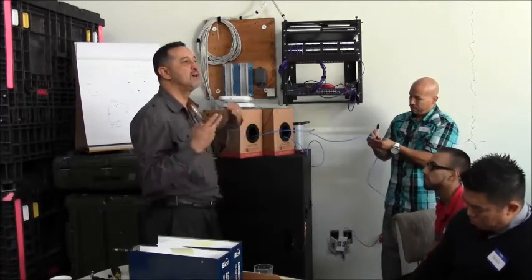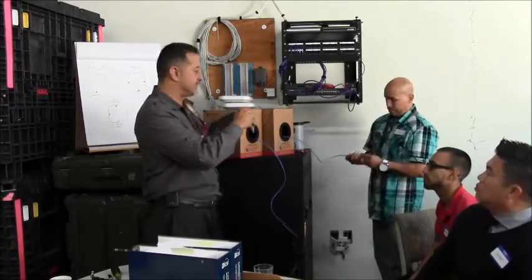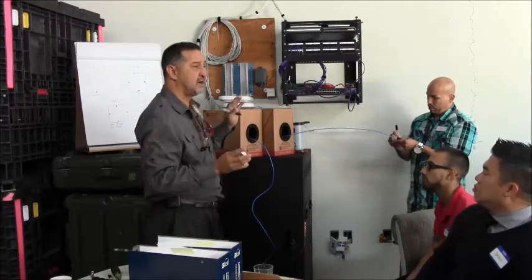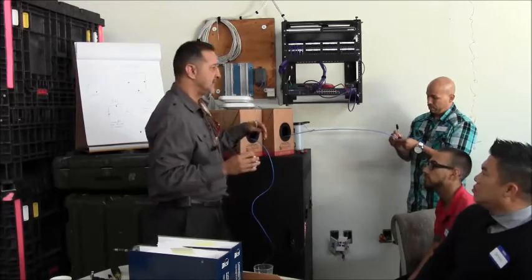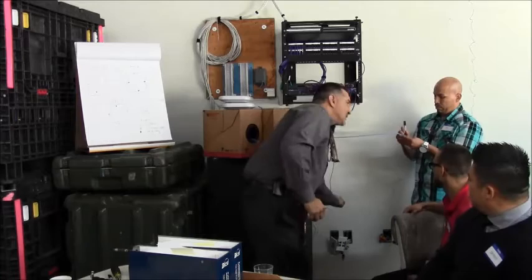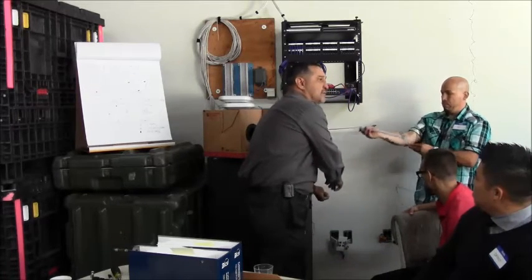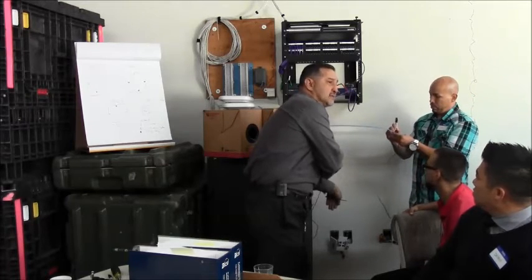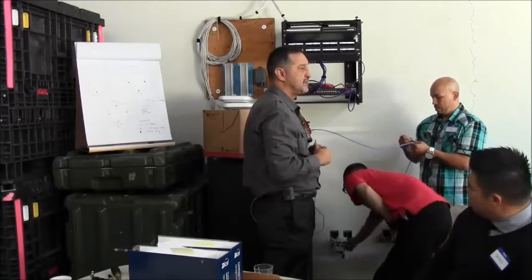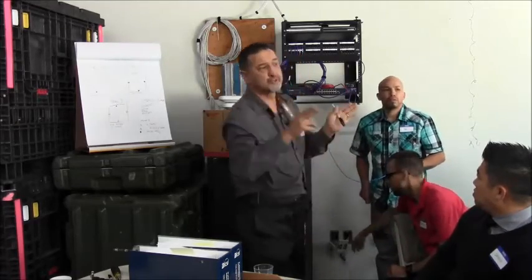And the reason why we do the arm's length, I'll give you a good example: when you make the heads to pull the string, the tape will get on the tip and then your numbers will come off. The other reason for that spacing is when you go down the wall and fish it out of the wall, you're going to need a couple feet to get the label, so that gives you 2 extra feet for the label that comes down the wall. It's important not to lose that label, because when you've got thousands of cables, if you mess up one cable number, you can screw up the whole line.